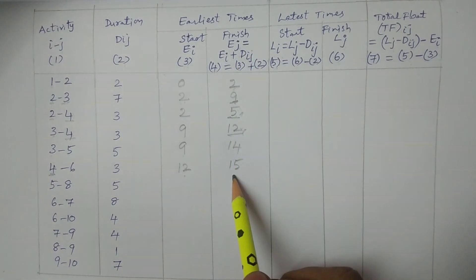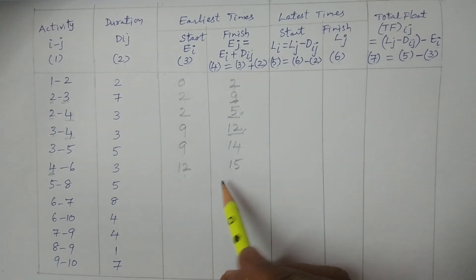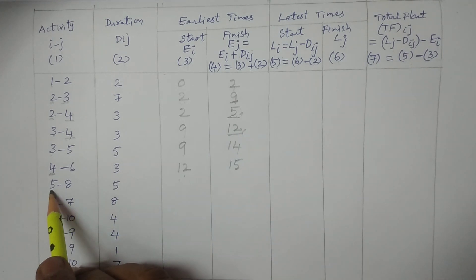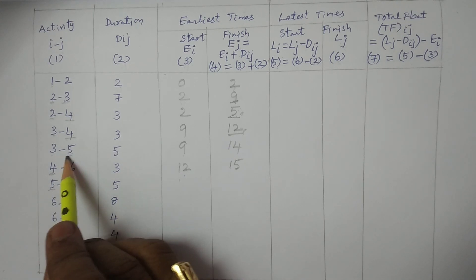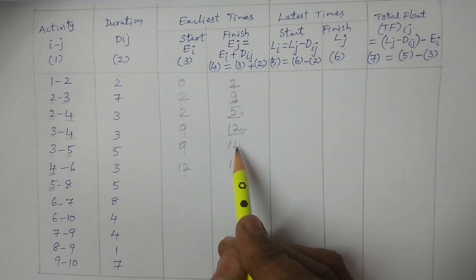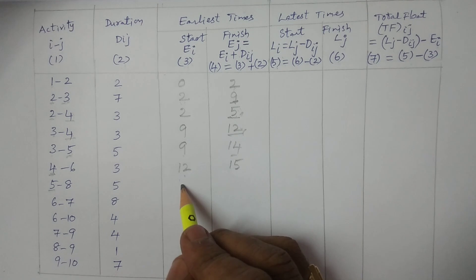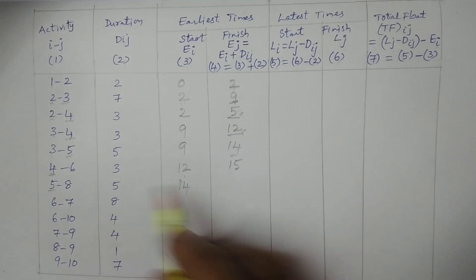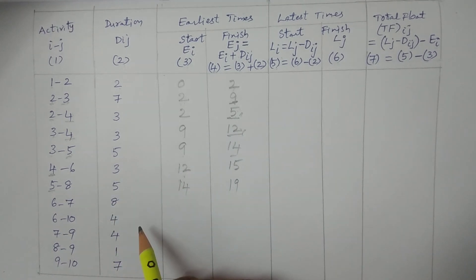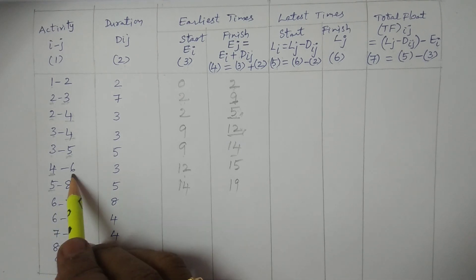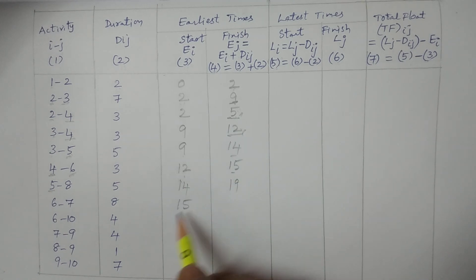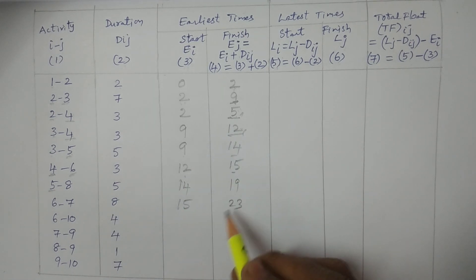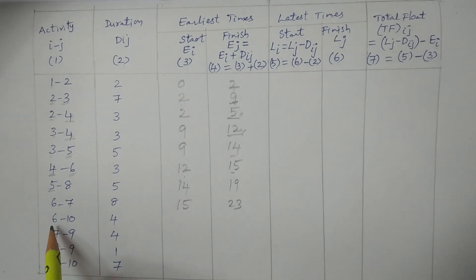For E5: J equals 5, from 3 to 5, only one value — 14. So E5 is 14. 14 plus 5 equals 19. For event 6: from 4 to 6, only one value — 15. 15 plus 8 equals 23. Then 6 to 7 and 6 to 10, both from node 6: value is 15. 15 plus 4 equals 19.